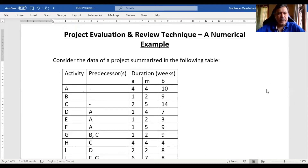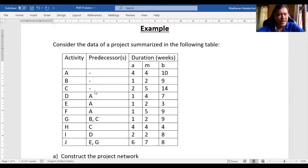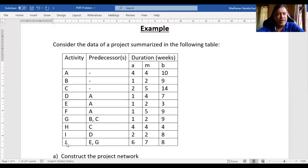Consider the data of a project summarized in the following table, wherein certain activities and their predecessors are given. Predecessors are the preceding activities. For example, activities A, B, and C do not have any preceding activity, which is why it is mentioned as dash. To start activity D, E, or F, activity A must already be completed. Activity G can start only after completion of both B and C. Activity J can start only after completion of activities E and G.